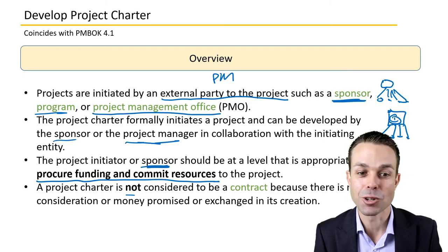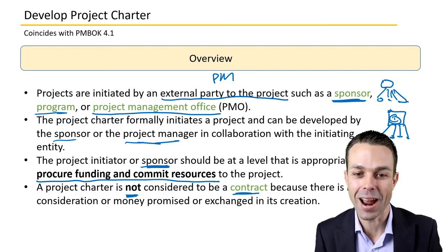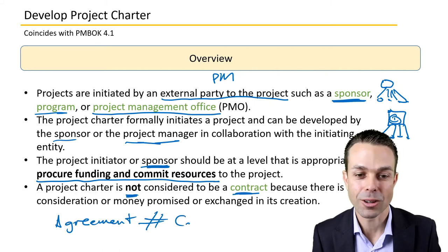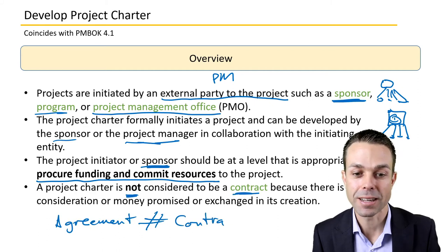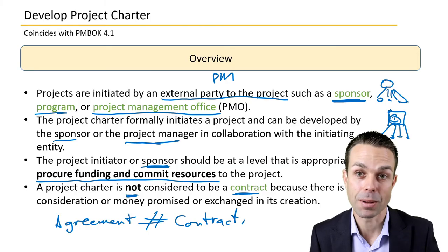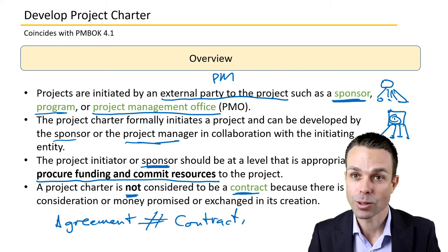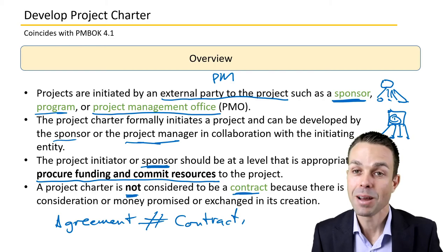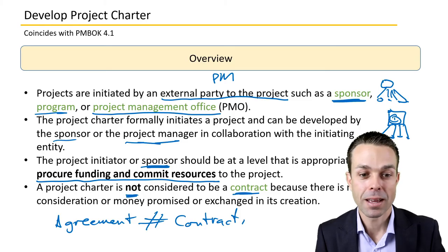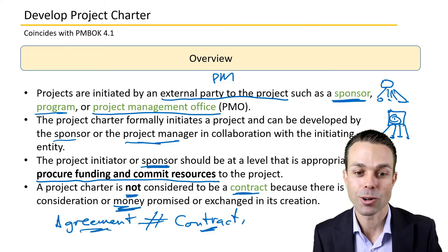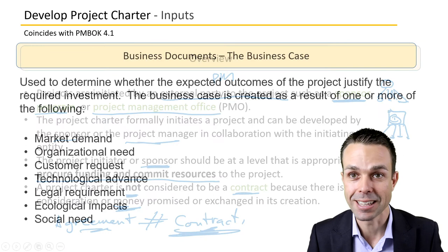Lastly, a project charter is not considered a contract. It's an agreement, but it's not a contract because there's no money changing hands. There might be money changing hands if you're bringing in third parties, but you'll have a contract separate from the project charter itself. That's a key thing for the PMP exam — because there's no money exchanged, it's simply an agreement, not a contract. A contract is specifically when money is exchanged.